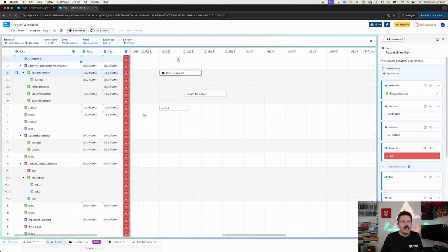But what's really cool is I can go put a date, right? So I can say, hey, this is gonna be the date for this milestone. But instead of it showing up like a bar with the start and an end date, I can simply right click on it and I can click on display as a Gantt milestone. And that's gonna turn it into a traditional milestone with that due date driving the placement and the map.